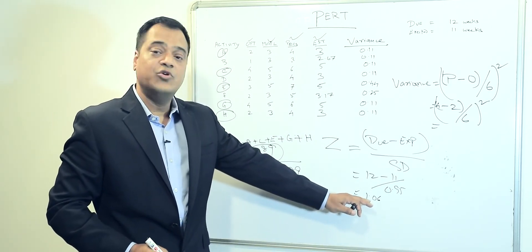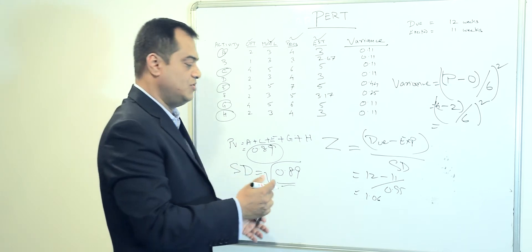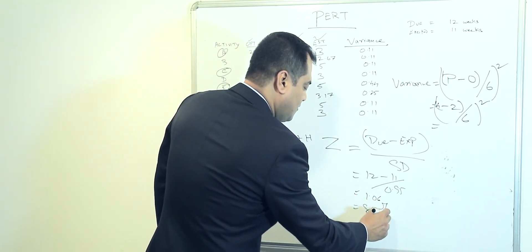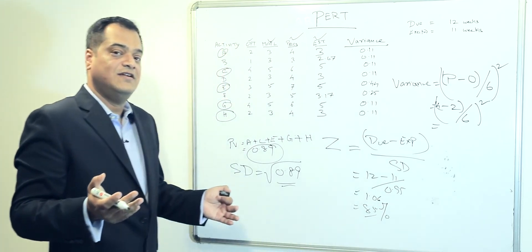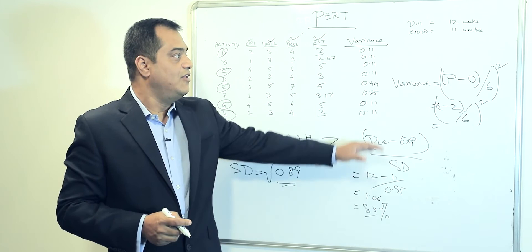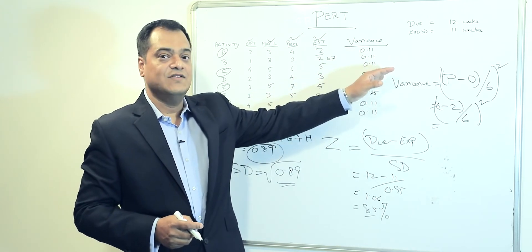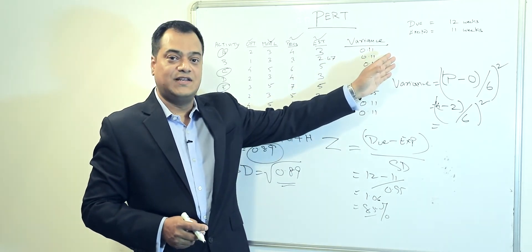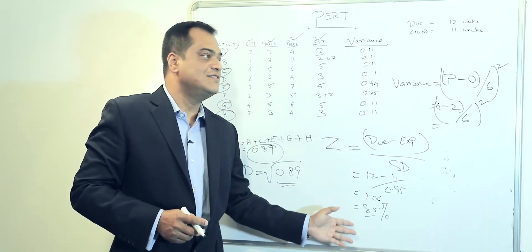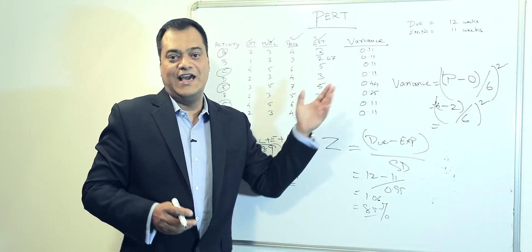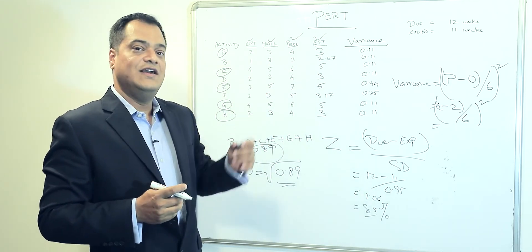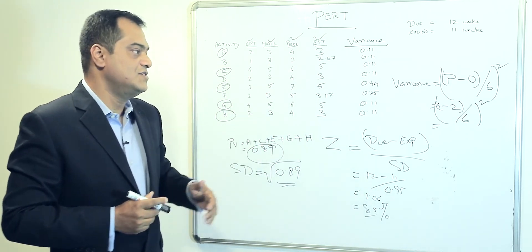Looking up 1.06 in the normal distribution table gives us 85%. This means there is an 85% chance we can deliver the project as per our expected value, and a 15% chance that we cannot deliver as per our expected value. PERT is a technique that covers this uncertainty and calculates the probability of achieving our expected outcome.